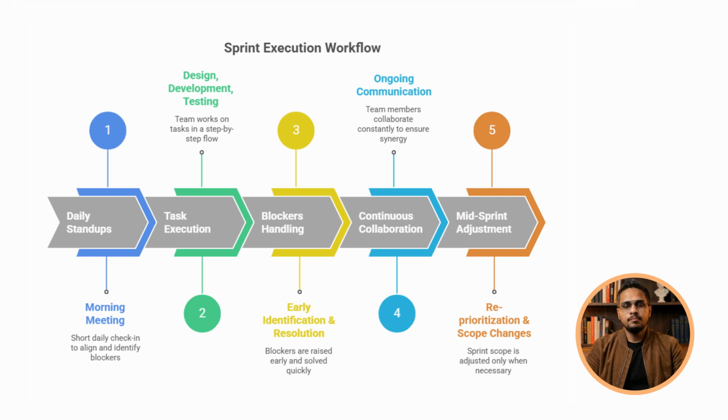Now, another component is the mid-sprint adjustment. Sometimes things don't go as planned. You may need to reprioritize the planned work, drop low-value tasks, and adjust the scope due to various reasons, but don't disrupt the sprint unnecessarily, only when needed.